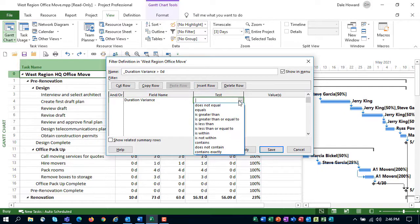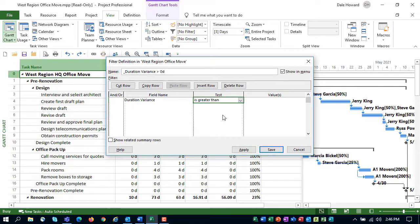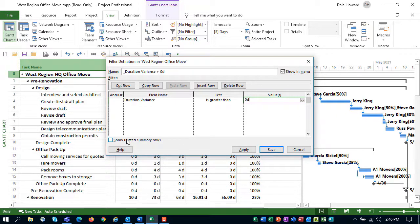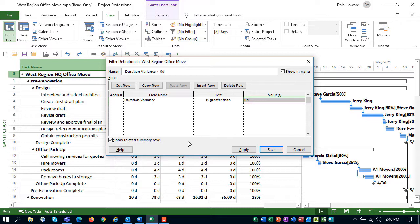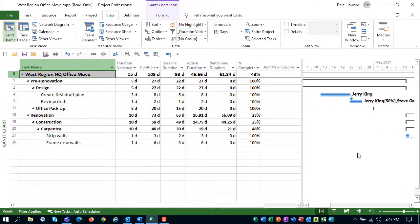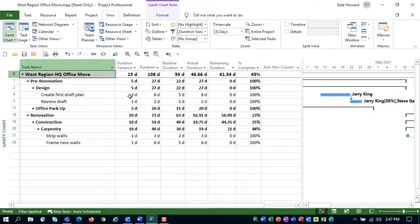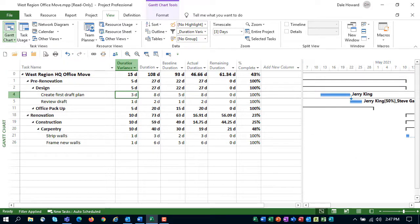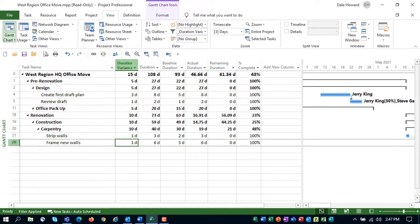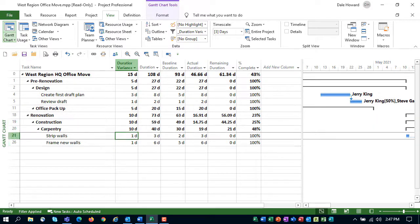In the Test column, select the Is greater than test, and in the Values column, enter 0D or just 0. That will work as well. Then select the checkbox called Show Related Summary Rows so you can see the Summary tasks for every task whose duration variance is greater than 0. Finally, click the Apply button to test your new filter. If you look in the Duration Variance column in my project, you can clearly see that every task with a duration variance greater than 0 is displayed by the custom filter.